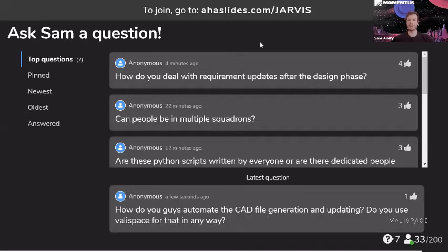We have to bring in some people and everyone has to approve. But if it's a systems level requirement, changing some detail of the design of the spacecraft bus, we generally use a process where the project manager and the technical lead both approve the change, and then it can move forward.